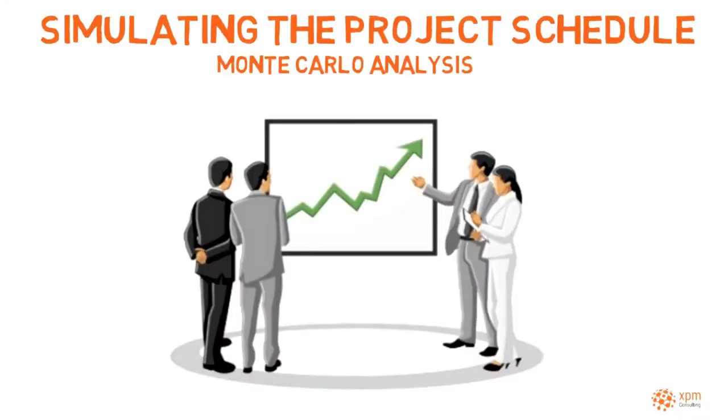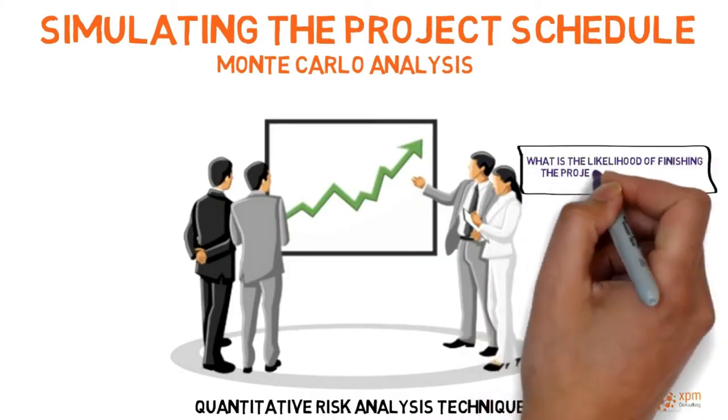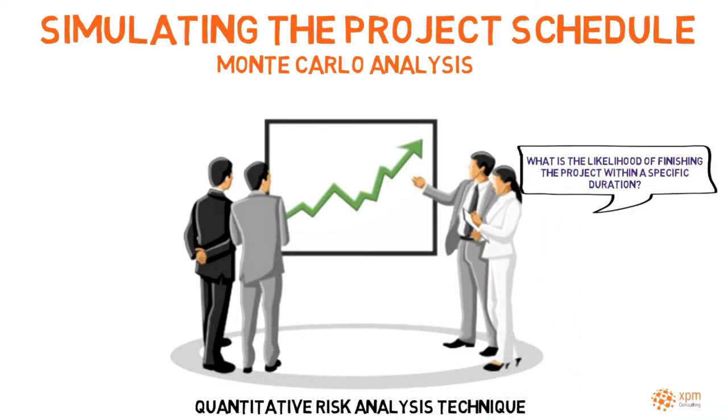Before approving the schedule, the project manager can run a Monte Carlo simulation. Monte Carlo analysis is a quantitative risk analysis technique. In the schedule management context, it is used to assess schedule risk, answering questions such as: what is the likelihood of finishing the project within a specific project duration?